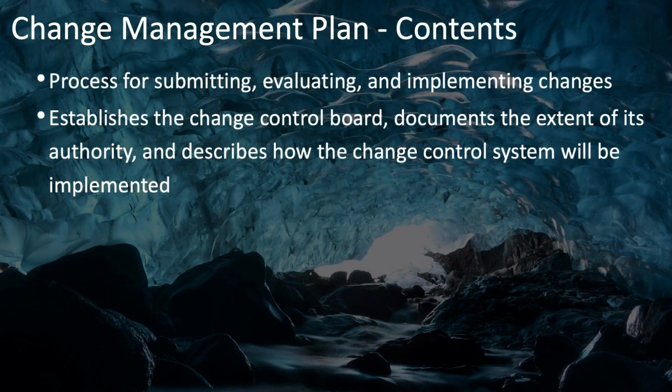The change management plan should document everything about change requests: who's allowed to submit them and how, what sort of form they should use, and how this form should be submitted to the change control board. Is there a system involved for submitting these requests? And everything about the process. How are they reviewed? Who reviews them? Is it a change control board or someone else? Is it just the project sponsor? When and how often are these meetings to review changes?